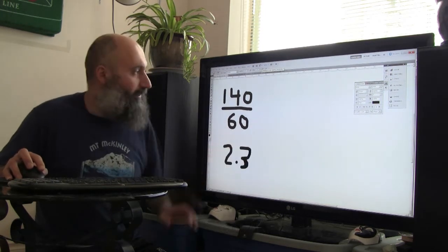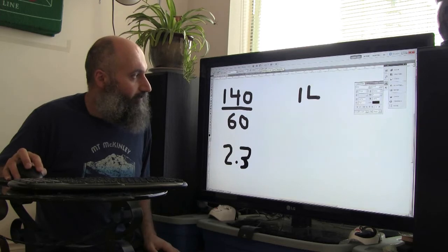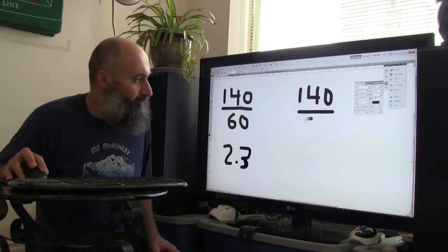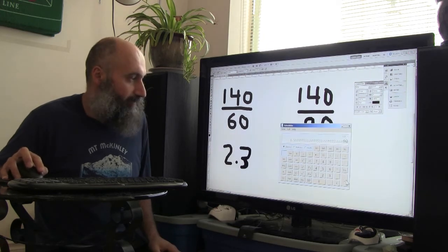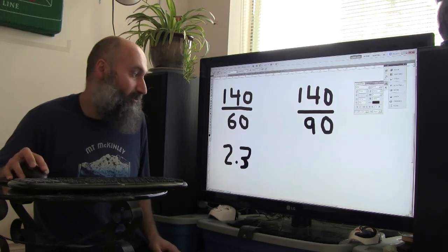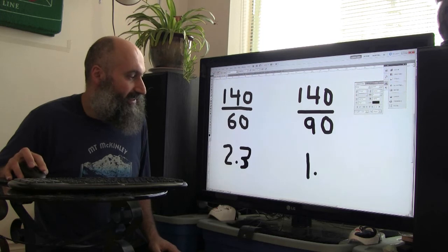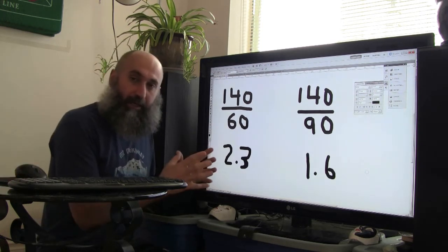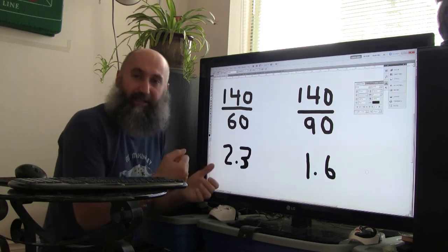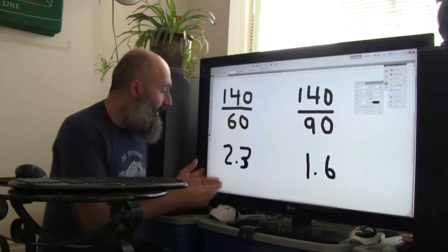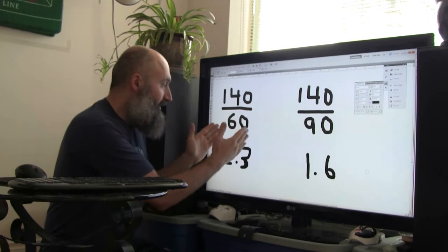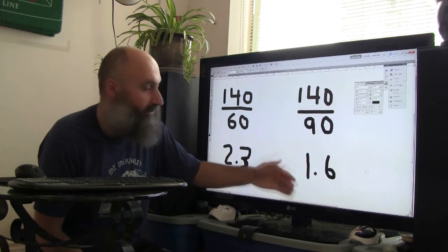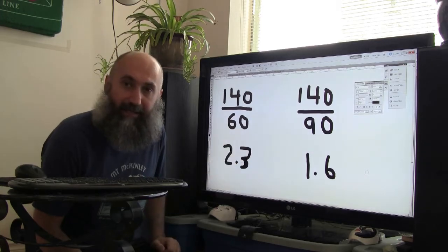On the long end of it, it was 140 divided by 90, 3 months. And that's 1.6 videos a day. So if I was going to budget my time based on the number of videos I needed to edit per day, it would have been 2.3 videos to stay on my 2-month schedule, or 1.6 videos to stay on my 90-day schedule.